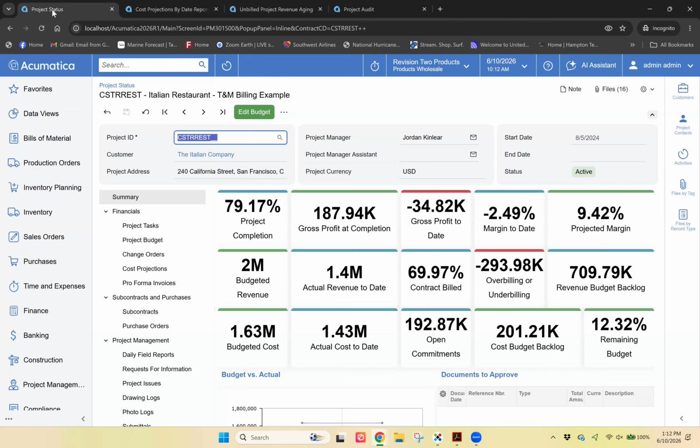Right now there could be more uncertainty on the material side than most people are comfortable with, so they may want to lock in those prices now, get that material and hold it. But there also could be costs there if they don't have the storage space or what have you. So that gives you more visibility on what you have potentially coming down the pike, to give both the finance side and the project side the tools that they need to make the right business decision for the individual project.